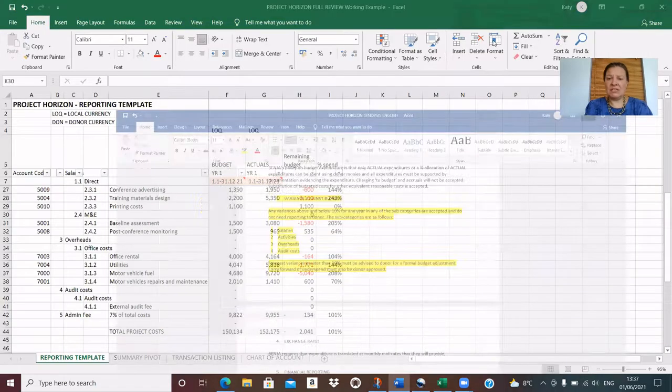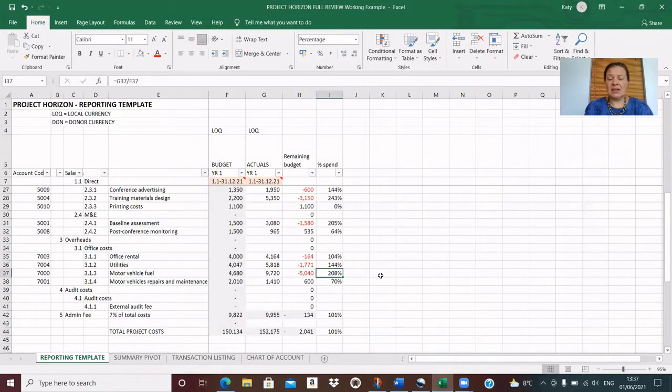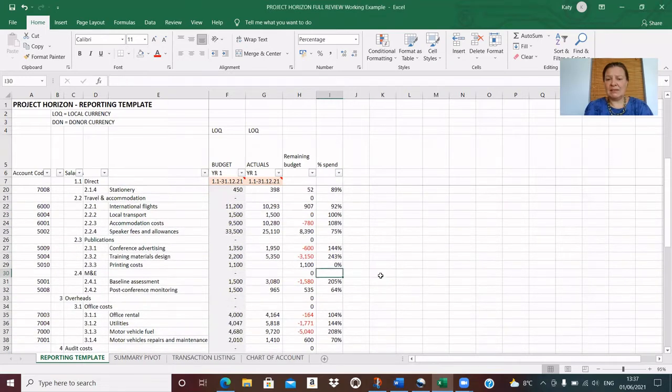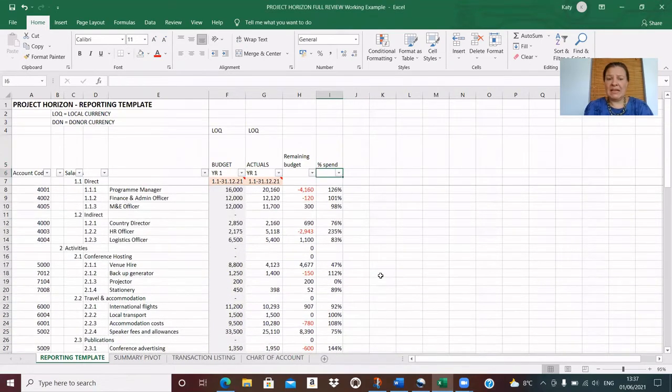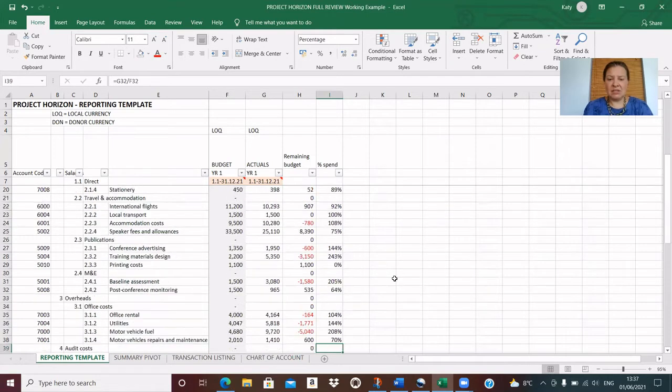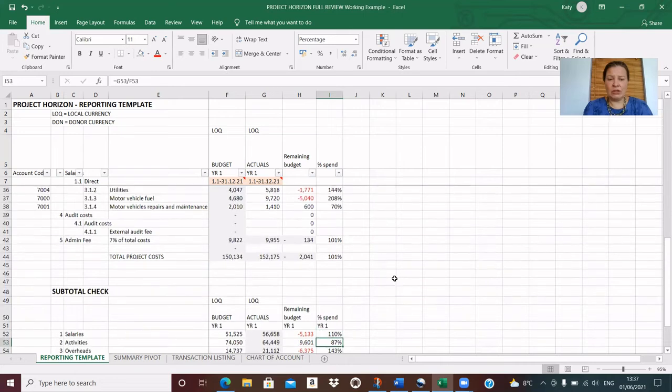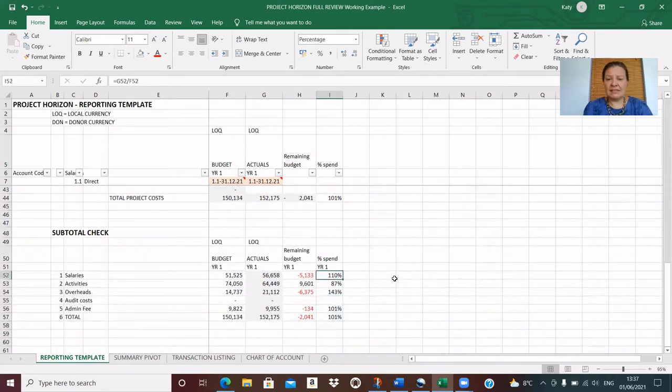So what is important is that we are looking at not only our percentage spend line by line, but we need to be checking that within our subcategories, there is not 10% variance. So what I have done to monitor that, below the project, is a little summary by subcategory. All I've done here is put in formulas that sum up all the costs by each subcategory.